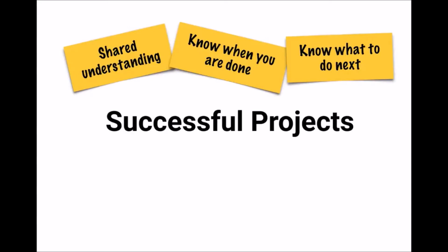And this failing test can be a really good driver. Those of you that have worked in a TDD approach know that the next failing test that you write gives you absolute clarity about what code you need to write next. That test needs you to write a specific piece of code and only a specific piece of code to move on to the next increment of the product. The failing acceptance test, at a coarser level of granularity, tells you which piece of functionality you're working on now. When it's failing, you know you have to get it to pass. When it's passing, you know you can go back to your Scrum board and pick the next thing to work on.